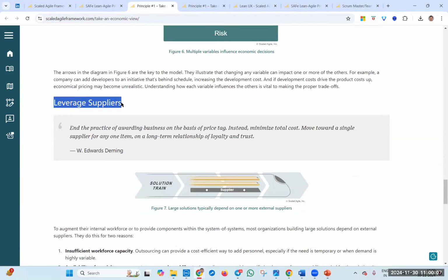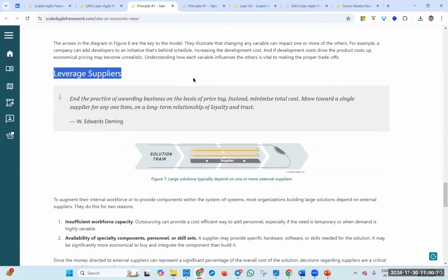And the suppliers: if you observe, many companies are relying heavily on suppliers these days, including Tesla, if you have to mention. Instead of reinventing the wheel, they're trying to make use of Google Maps for their autonomous vehicles. So an additional aspect is the price tag. Are we okay to spend 1 year of time building an in-house product, spending $1 million, versus going for a ready-made solution, which might cost us $2 million, but will save us 1 year of time and effort?